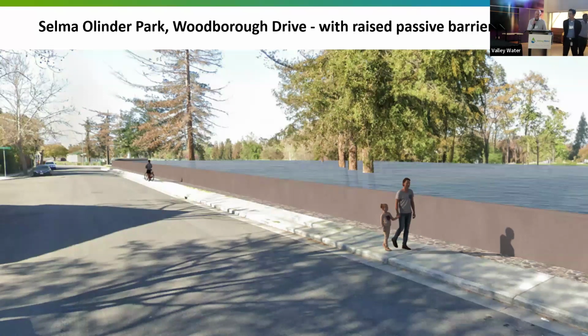Hi, thanks for that question. I think the best way to address this is that we have to go through a permitting process. The City is removing some trees and habitat along the creek. We were required to go through a permitting process, and for those impacts to return function and values to the stream where there's been temporary or permanent disturbance.